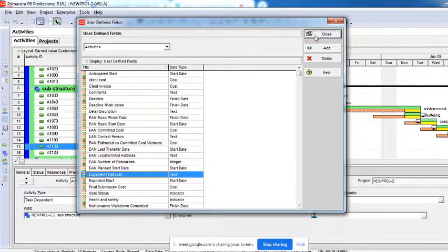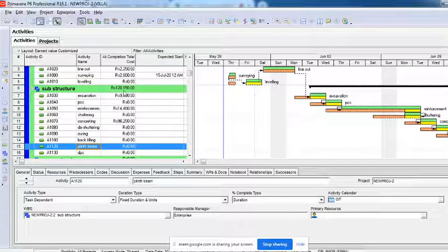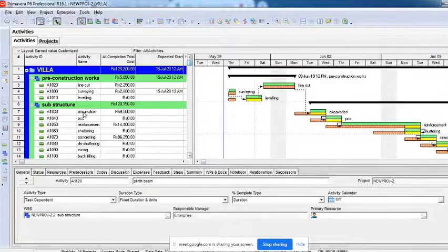Usually, what do you mean by this expected final cost? Now this cost, what you are seeing, is all with respect to your raw material, machineries, expenses and all, right? But this is not the cost you want to show to your client. Do you want to show the same cost? Then he'll pay only so much. Don't you want any profits for your company? For each and every activity, you will have to add your profit to it, and then you will have to show the expenses. That is the final cost.